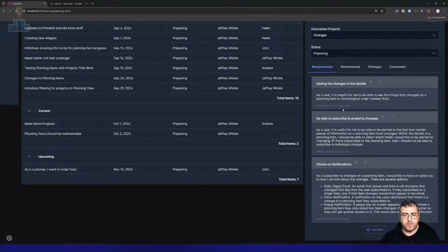At the point the developers are comfortable, the requirements are understandable, and they understand where in the system they'll be changing things, they can gather the right people and sit down and say, okay, this requirement yields a story for adding a page here, adding an endpoint here, doing this. These are three different pieces. Each one adds value, each one is testable, each one is independent, etc. So they generate the stories from these requirements.